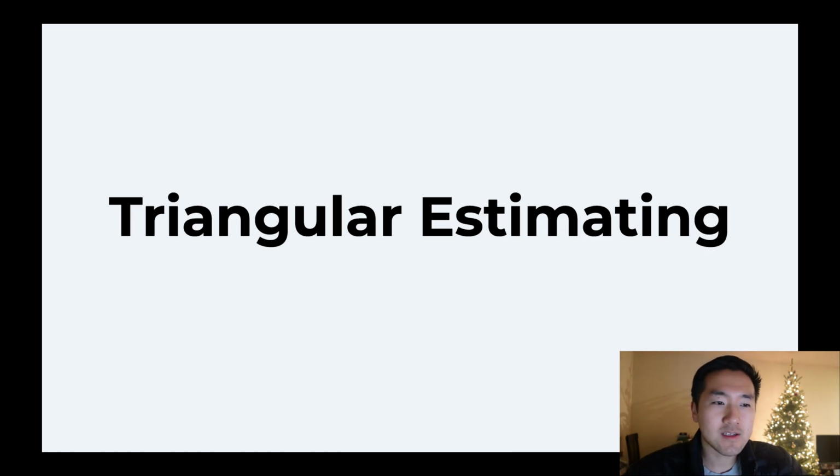There is a low ball estimation, there is a high ball estimation, and then there's a conservative estimation in the middle. So basically, this can be applied to anything in a project, whether you're estimating the time, the cost, really anything that you can think of. It's taking those 3 estimations and then dividing it by 3 to get an estimate that you can use for the project.